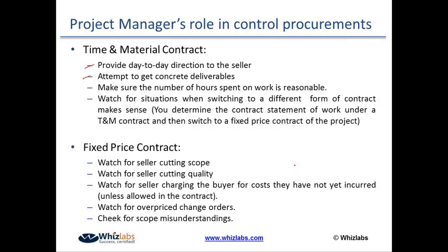And then, as I said, the fixed price contract, now cost is no longer my focus. Watch out for the sellers cutting on scope or quality. Scope and quality are my primary focus now. And also ensure that we have a proper change control process in place, wherein we monitor the change orders, whether they are actually part of the contract or they should be charged separately, etc., etc. And as I said, ensure that the SOW is written very aggressively and in a detailed way.